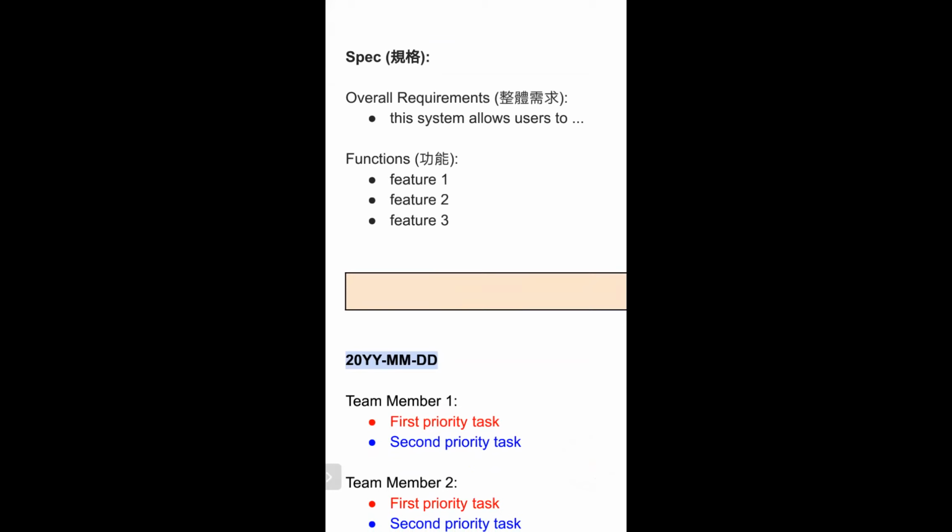So we prioritize things in red, which is the highest priority, blue, the next one, and black. You can think of it as the must have, the good to have, and the nice to have. Nice to have is, if we were to shoot for like 90, 95%, right? And the must have is kind of like the 60, 70, right?